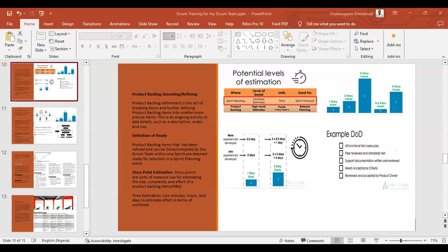A lot of tasks are to be carried out to deliver this user story, right? Now, the development team will have to estimate this foreclosure current system using story points, because they're going to consider the volume of work that will be involved to deliver this user story, and also consider the risk and maybe any other thing, right? So all the developers who are going to be involved will use story points to do that.